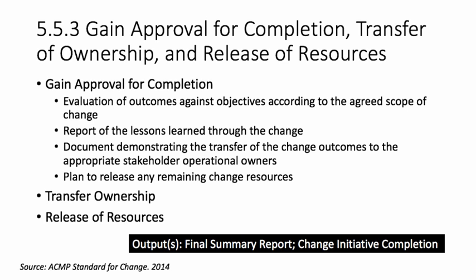The transfer of ownership. The ownership of all change outcomes, processes, technology, organizations, and other outcomes must be transferred from change resources to stakeholder operational resources. This should be evidenced by written agreement of both parties. Additionally, transfer of future strategy plans must also occur as part of the outcomes. All change resources should be released and made available for use in other change efforts.